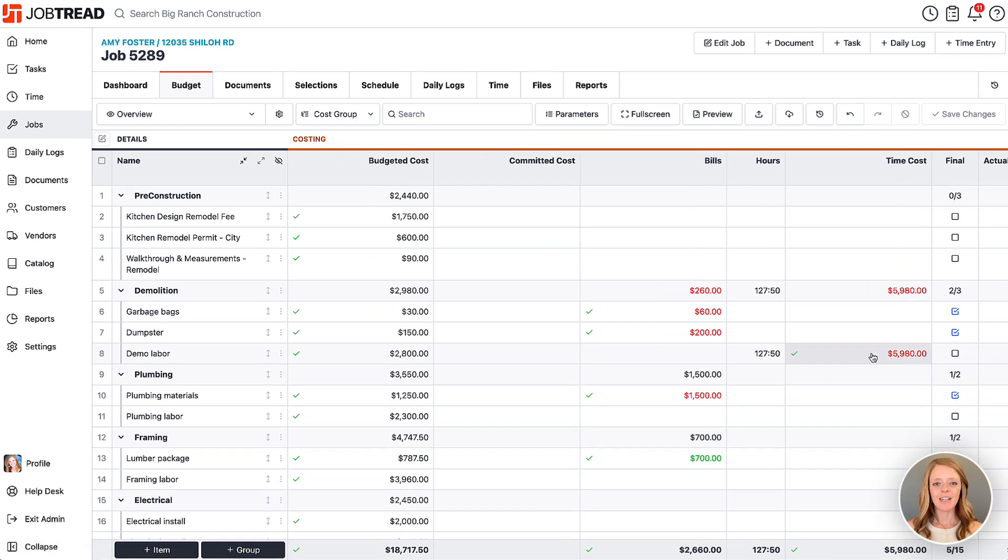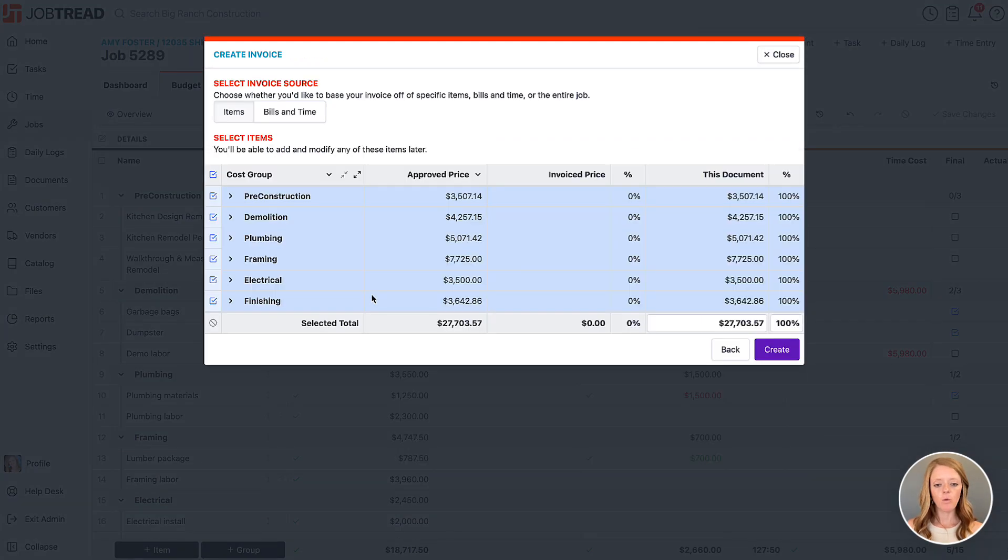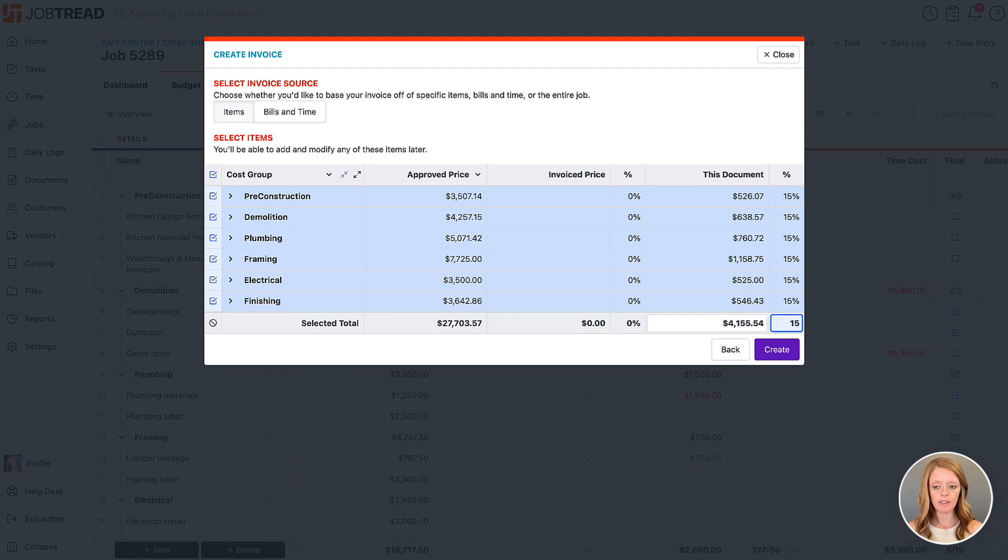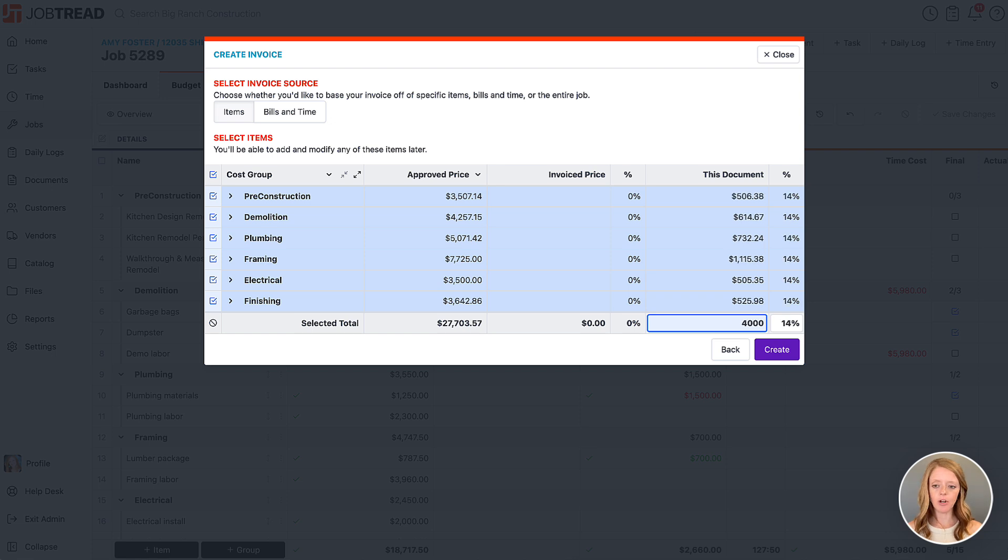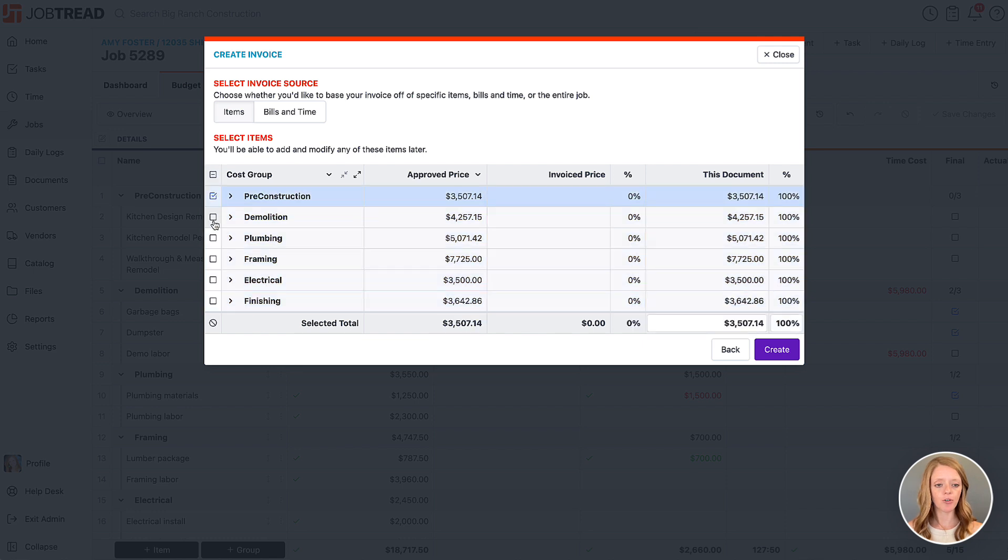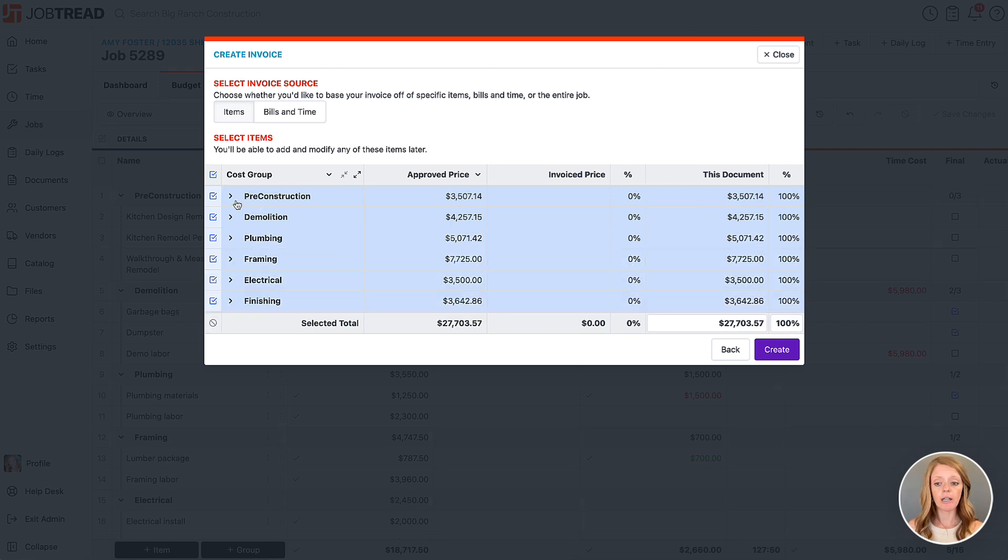Now we're going to create an invoice for this. I'll click plus document and choose my invoice template. Now we'll choose how much we want to invoice for. Let's assume this is a fixed price job. You're going to choose the percentage based on the total - maybe I want to invoice 15% off the total, or I just want to do a lump sum total of $4,000, that's 14%. Or you can also choose based on phase, maybe I just want to charge for two phases of the project at 50% off both phases. It's completely up to you with how you are invoicing in a fixed price capacity.